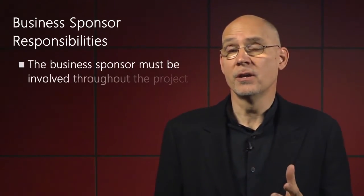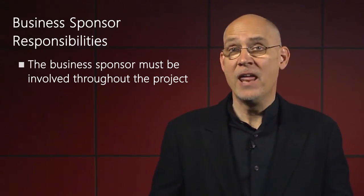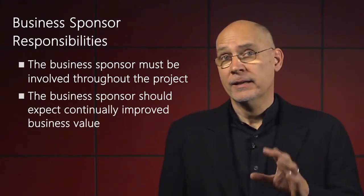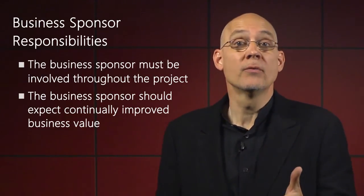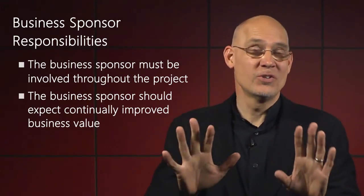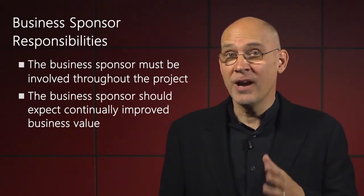Adopting an Agile process also changes how a development team interacts with its business sponsor. One obvious change is that the business sponsor must be involved throughout the project. Rather than defining requirements up front and hoping the team delivers the right thing, the product owner plays an active role in each iteration. The business sponsor should also expect continually improved business value, expressed in working software, rather than precise compliance with a long-term plan. This changes how project management is done, which can upset traditional project managers. It's fair to say that people in this role can sometimes find the move to Agile processes uncomfortable.